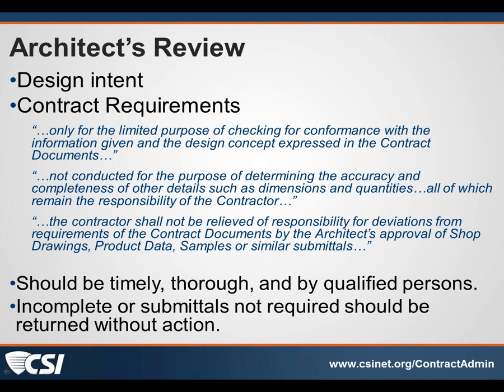Two issues with incomplete submittals. One is the piece that's missing could have a big impact on the piece that you're trying to look at, and what you're looking at may look like, yeah, this is going to work, it's acceptable, and then you get the rest of it and, wait a minute, this doesn't work. And so something that you've returned that says, yeah, this looks okay, then you find out later on, no, it's not okay. That's a big problem with looking at these things piecemeal.